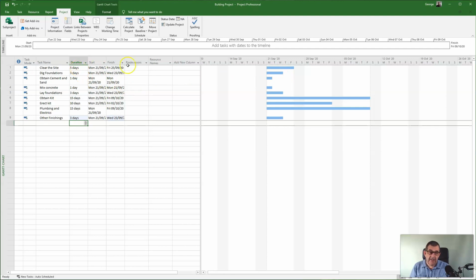So clear site is 5 days, so that's Monday, Tuesday, Wednesday, Thursday, Friday. 5 days there. I've got Monday, Tuesday, Wednesday, 3 days there. That's 1 day. That's 1 day. That's another 3 days. Now this is 15 days, so I've got 5, 10, 15. It doesn't count Saturday and Sunday as working days. Here I've got 10 days, and so on.